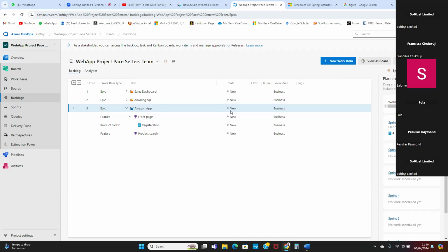Then each product backlog represents a split of the overall feature and overall epic. So that means the product backlog is the least component of every epic. And it's the one that we could easily call the sprint then? Yes, that is the one going into the sprint, where you start estimating and start moving your tickets on.